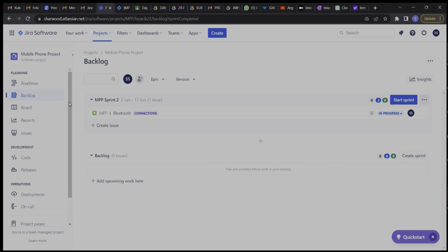But if we are not able to have any increment by the end of the sprint, we just review. We are just going to review with them what we have been working on so far, since we're not able to have a done increment by the end of the sprint. All right, so let's assume that we've had our review, and then we've had the feedback. What is the next event that we are supposed to have after that? Retrospective. The retrospective.